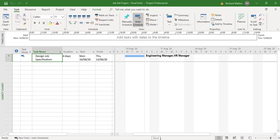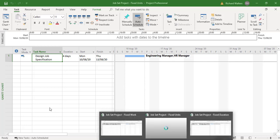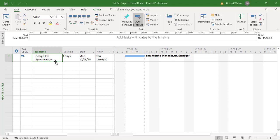In this video we're going to look at the types of tasks that exist in Microsoft Project. There are three types of tasks: tasks with fixed units, tasks with fixed duration, and tasks with fixed work.